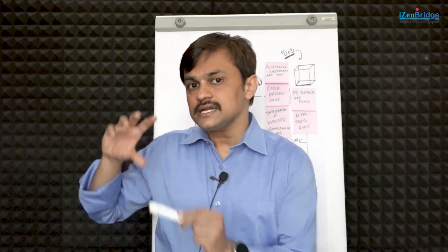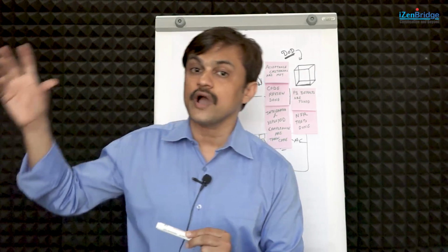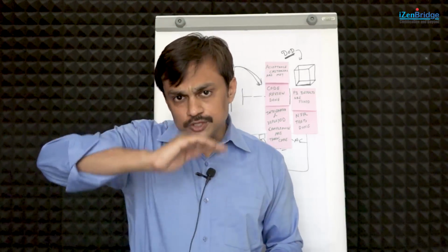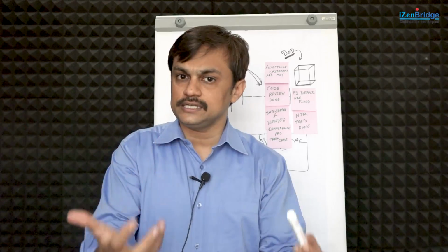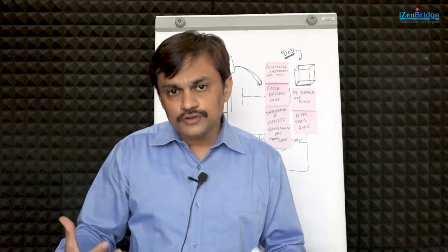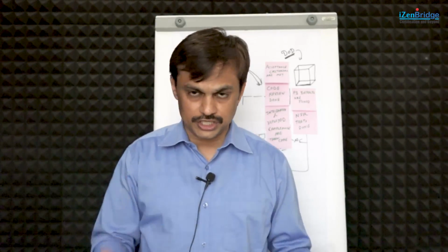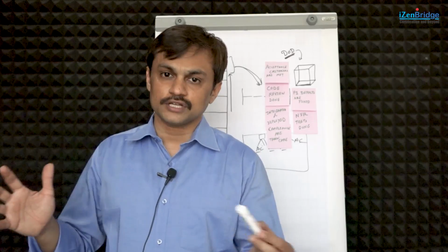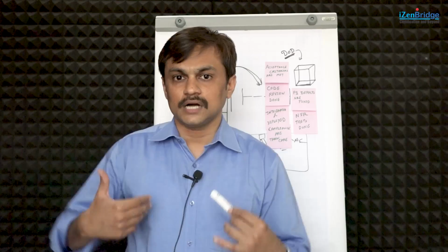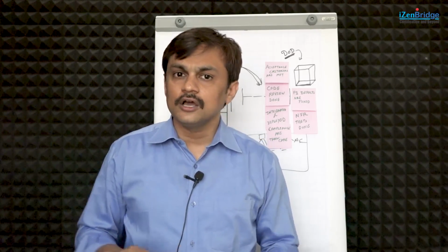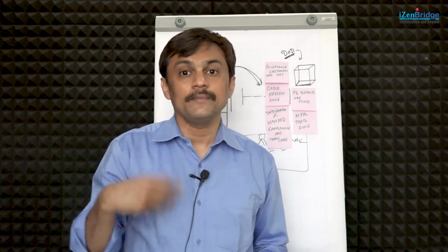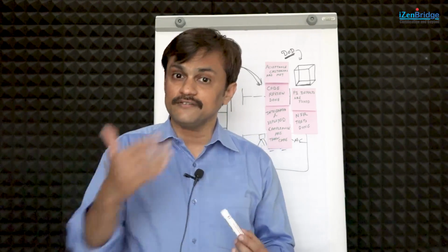So, the acceptance criteria and user stories come from the people who have the requirement, the user perspective, the product owner, the business stakeholder, whereas the definition of done comes from the internal quality processes or the team's understanding of what all should be done. So, the definition of done is something which is developed by the project team, definitely in consultation with the respective stakeholders so that we have a common understanding. But the business guy, I am just going for ordering a burger, may not understand all the aspects which are involved in preparing the burger. So, I might not be qualified enough to create a definition of done for it.